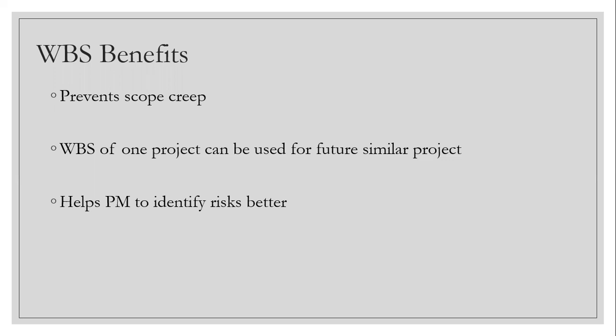For the program manager or the lead project manager, it's simple when they look into the WBS and they know these are the work packages which we finalized. We are not going to do anything beyond this, right? Anything which is missing there or not properly documented there is a risk. And the PM can easily find out the risk by working with the team: okay, I think this also has to be put as one of the packages, and then break it down further.